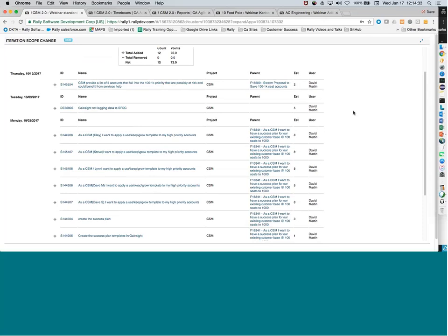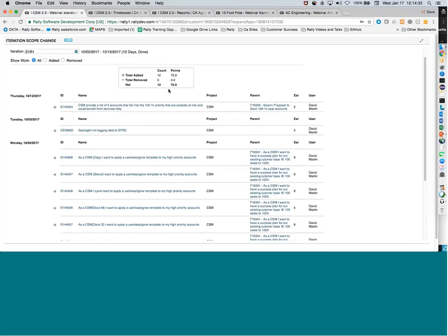All right, and the next Kanban-related report is cycle time. And what do I get with the cycle time? Well, the cycle time is going to show you the time it takes to move from a particular state to another particular state, whereas the lead time was showing us from end to end. The cycle time is a little more specific in showing us per particular state. So as I'm going through the process, I can see how long I'm spending in each of the steps in